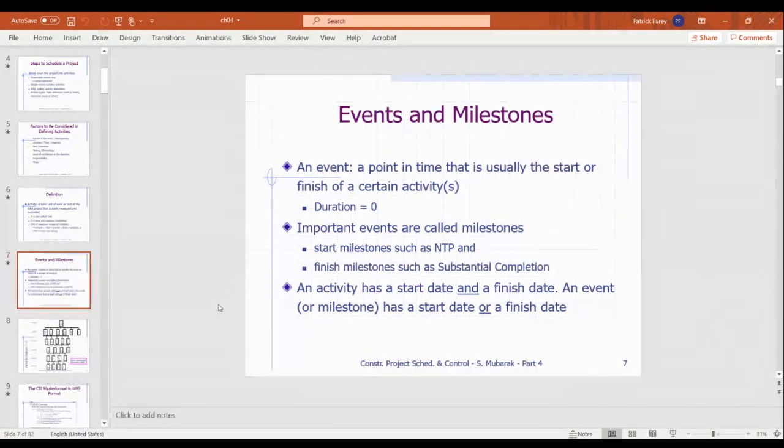So that's a pretty big milestone, or event, in any project. It's what kicks off all the billing for the contractor, the work by the contractor, the submittal process, getting shop drawings of all the equipment that you're bringing in. That allows the contractor to jump on it without having to wait for the lawyers to review the contract back and forth 4 times.